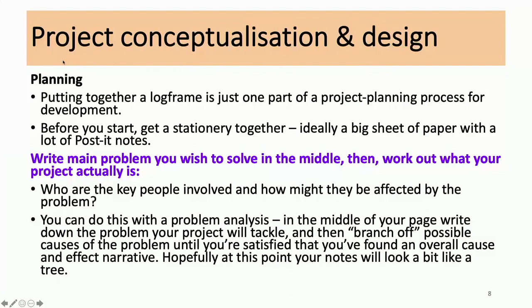Before you start, I advise you get some stationery together. Ideally a big sheet of paper with a whole range of post-it notes. The approach to this is to create what we call a problem tree. Write the main problem you wish to solve with this project in the middle of the page and work out what the project actually is.